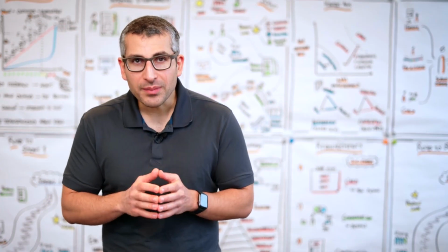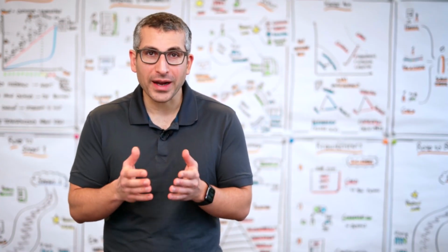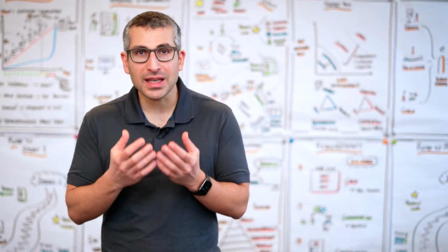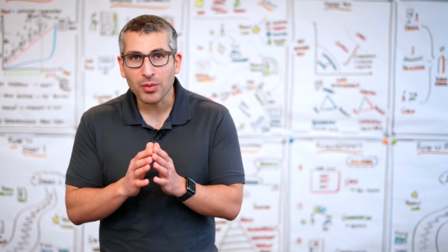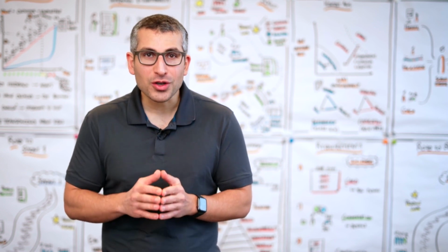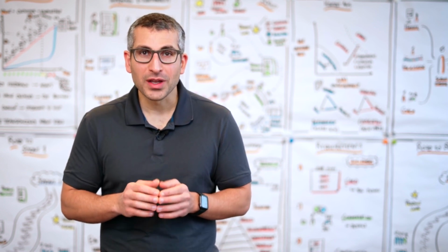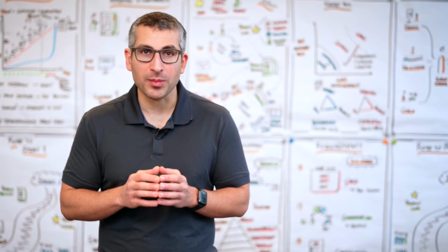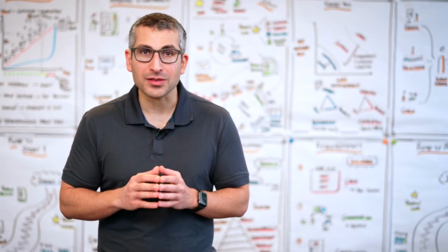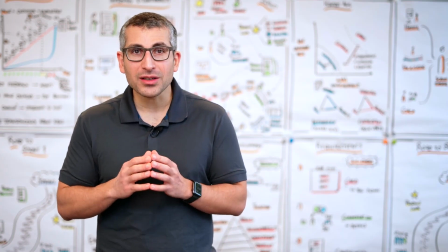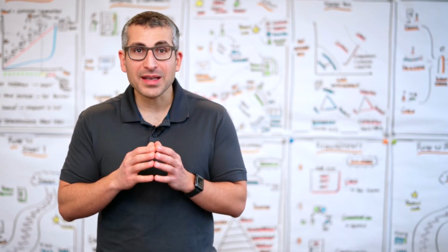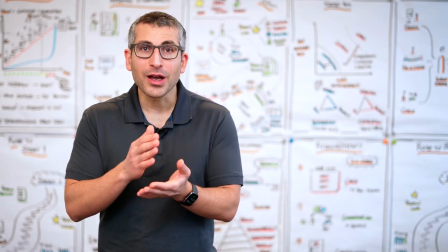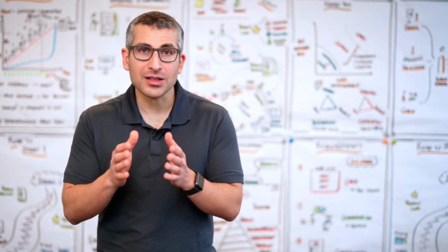But a user story is not the only way on how to write a requirement on a card. You can use many other ways. My preference is a user story. By the way, a user story is also a great stakeholder management tool because most stakeholders approach you with the what piece of a requirement and never with the why piece. So if you want to have a good understanding of whether it makes sense to build that requirement and how to prioritize it, always ask them to write it as a user story.